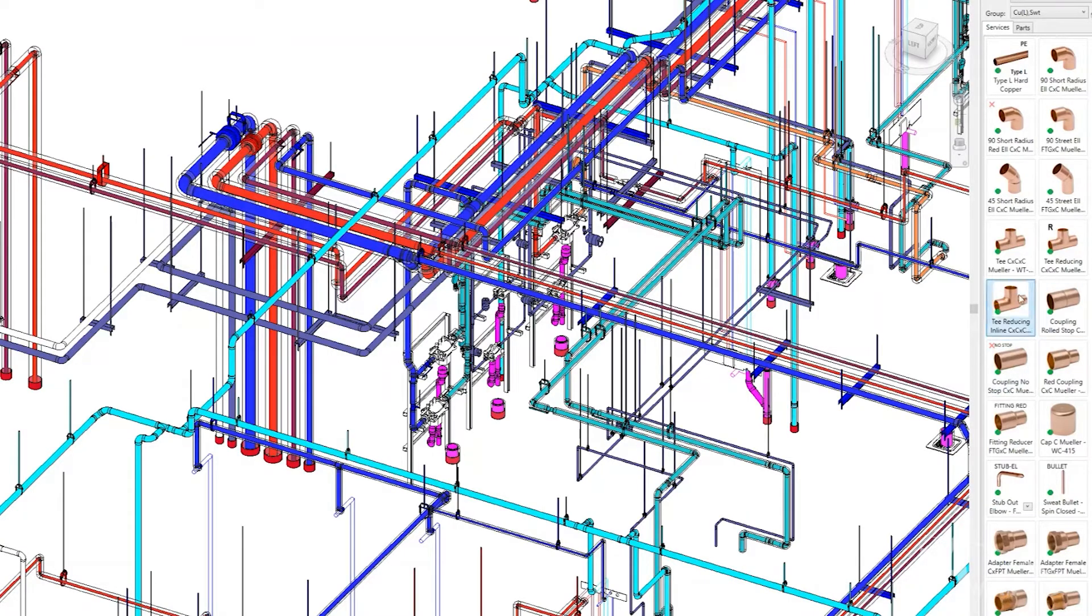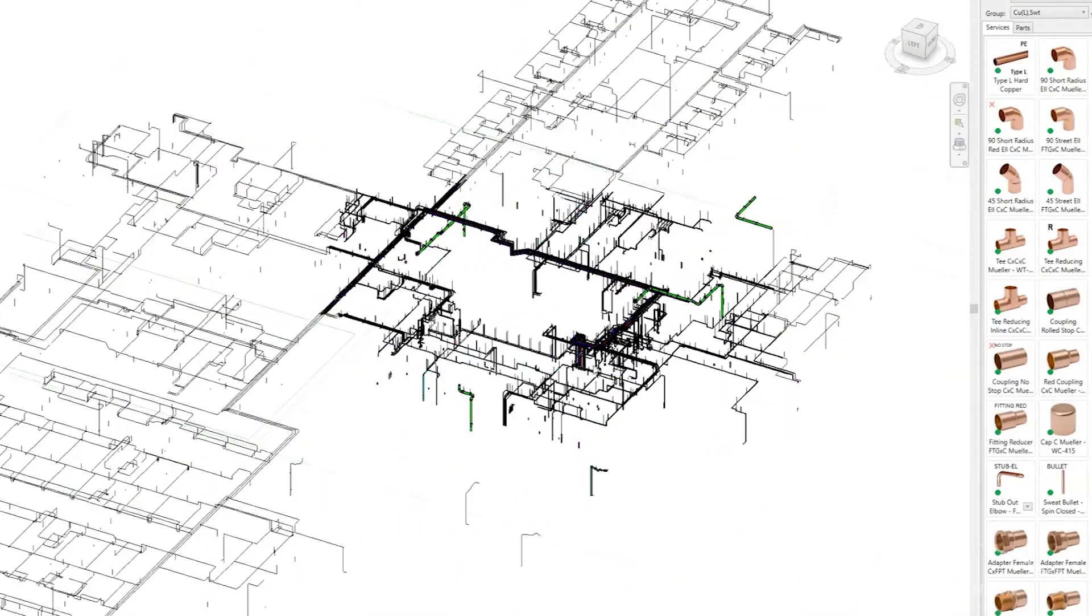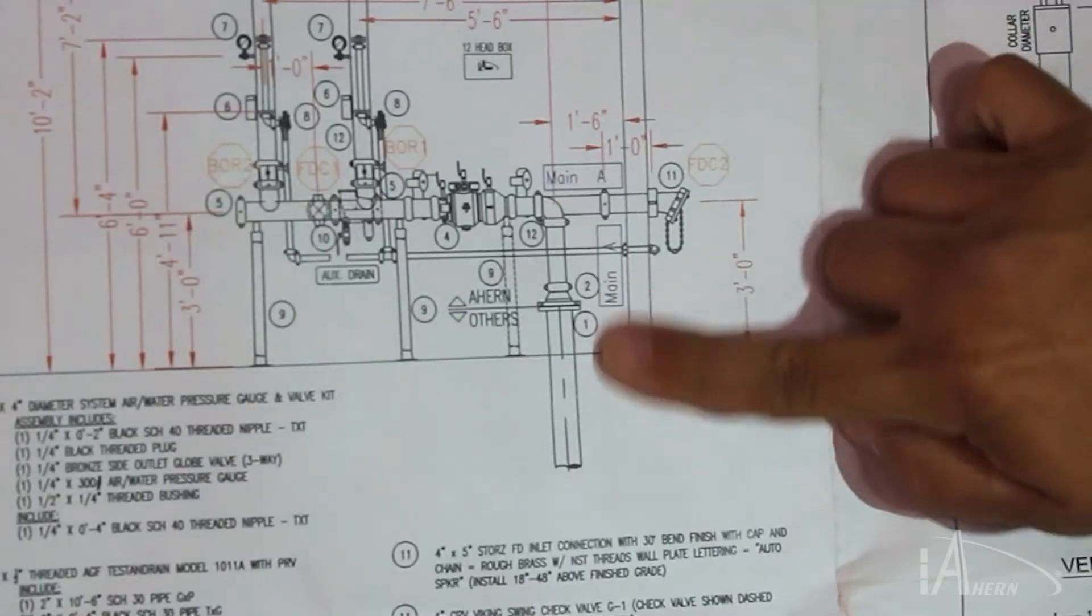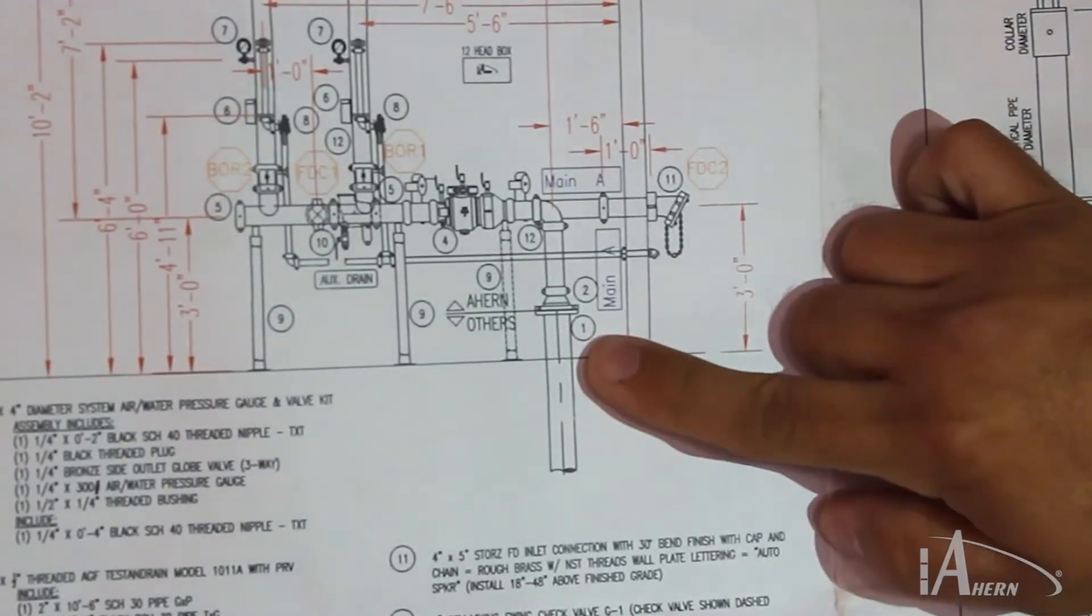Modeling can vary in levels of detail. On a project like Cumberland, we go to great levels of detail modeling with manufacturer and model specific parts and fittings to coordinate and fabricate from.